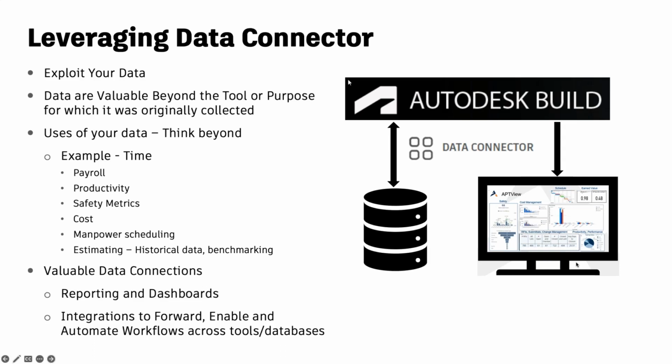But if I begin to integrate that piece of data with other data like quantities, I can start to look at productivity. I can look at the time worked and look at safety and develop safety metrics over time. I can look at daily cost. I can get measures of what I'm actually spending on a daily basis. I can do manpower curves. I can do manpower scheduling. I can do better estimating, and I can even get benchmark and historical data back into my estimating, all with that simple hours worked by employee.